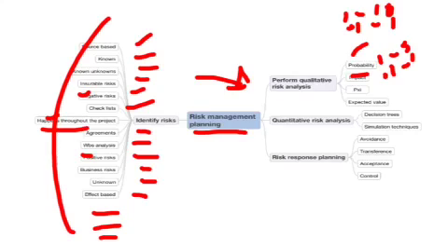So every risk is rated based on a probability number and an impact number, and P into I. We multiply the probability with impact and we get the P into I. So the P into I is also known as expected value or the expected monetary value of a risk. Then based on the P into I, we may have some cutoff, like if the P into I is 30 and above, we'll be managing. The rest can be under observation.